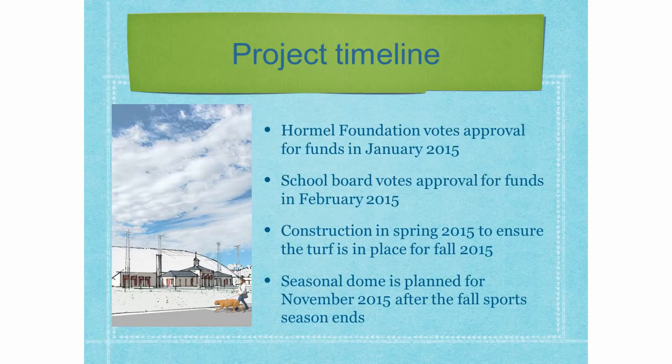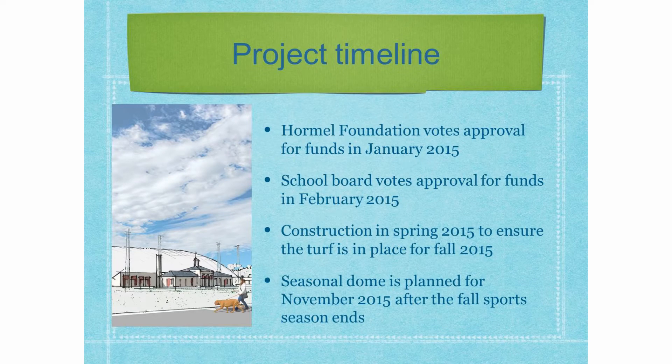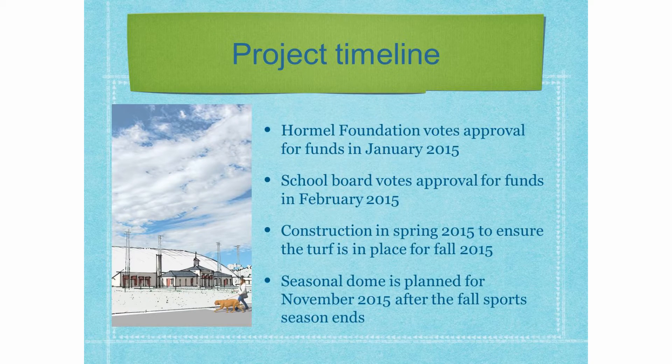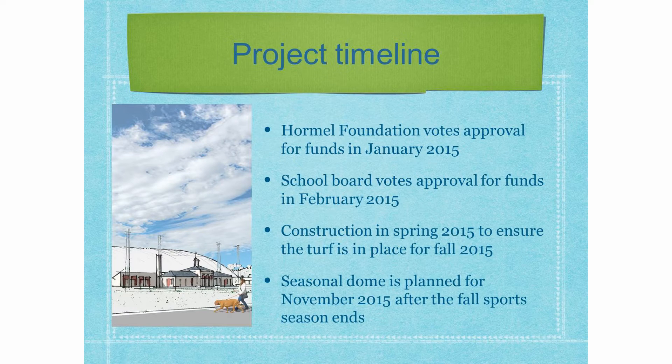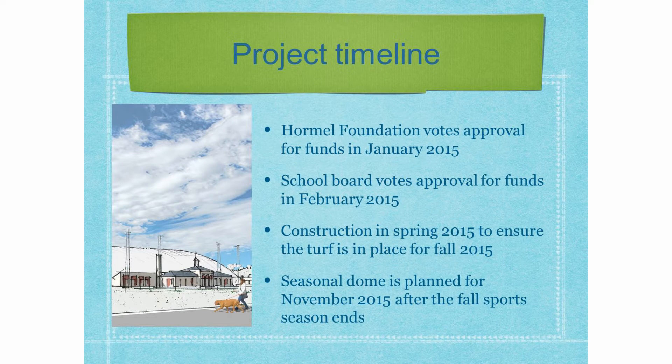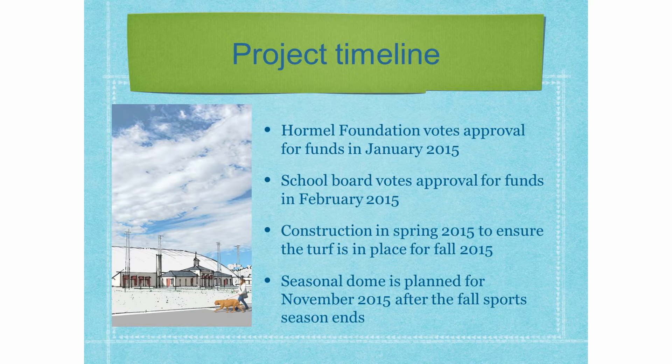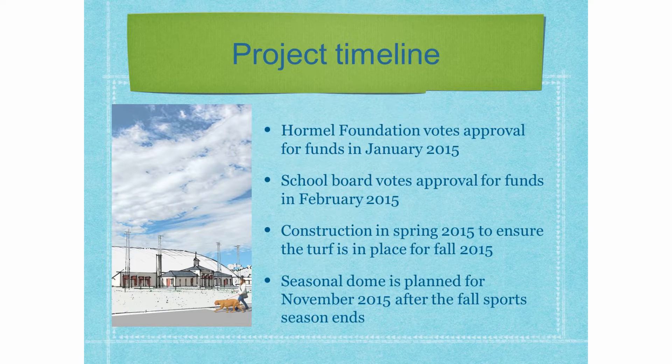So, the timeline, Hormel Foundation has already voted in January to provide funds for the project. The school board approved them earlier this month. Construction is set for spring 2015 and that way the turf will be in place for fall sports. And then the seasonal dome would first go up in November of 2015.